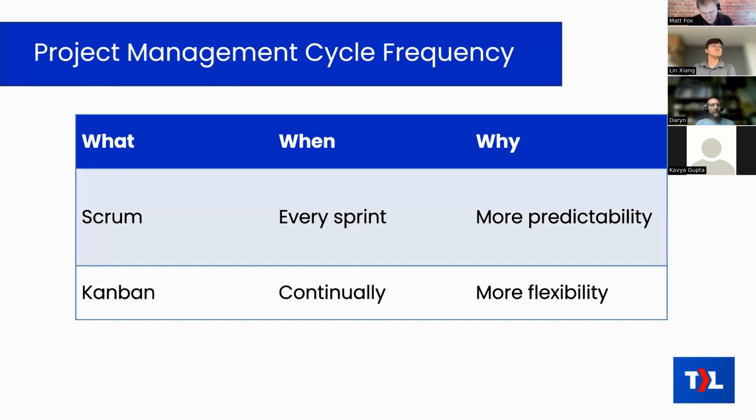The idea being that it's totally okay to just be constantly reordering the list of tickets that are to be done next. You still don't want to interrupt engineers when they're already working on a ticket. Okay, the stuff that you've started, you want to finish. If you don't do that, then you're increasing your work in progress, right? And we've talked about how you want to limit your work in progress. So anything that's already started by an engineer, a manager definitely needs to let them finish unless there's some sort of extraordinary situation where there's some emergency work or whatever. Last week we talked about how that should be rare. But the stuff that's coming up, next tickets to do, that's totally flexible.